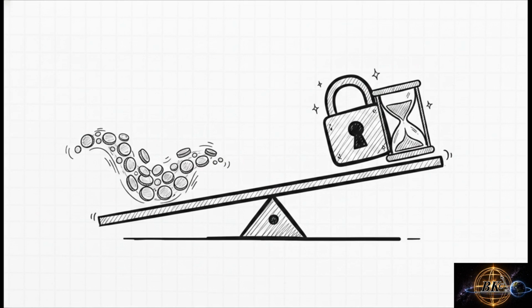And lastly, the pricing must be balanced. You can't just slap a blanket 15% margin on a project and call it a day. The estimating manager reviews the sequence of work to ensure cash flow integrity, meaning, will this project actually fund itself as it progresses, or are we going to be dangerously out of pocket? They check for contractual restrictions like value caps and weigh the final numbers against historical industry pricing just to make absolutely sure it makes sense in the real world.